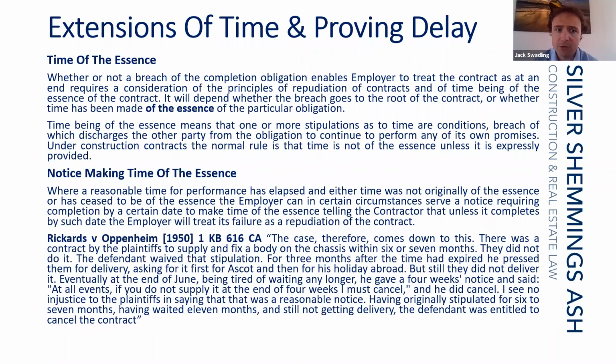So just quickly to go through these points, time of the essence. Where a completion date is not achieved, so the time obligation is breached, when we talk about time being of the essence of the contract, what we mean is that the completion date is a condition of the contract, and it would entitle the employer to treat the contract as discharged in the event that the contractor fails to complete on the completion date.